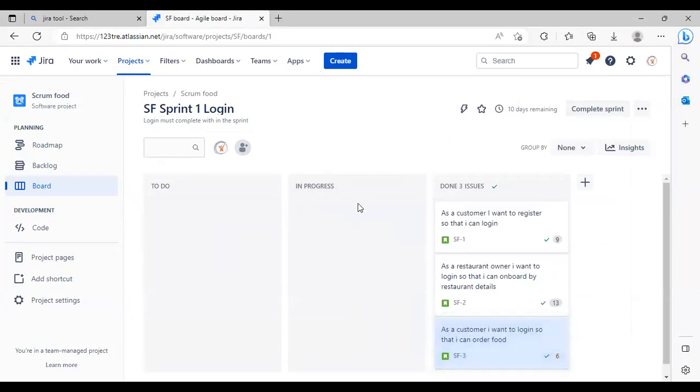In progress means the developer or the tester is developing these features, and once the feature has been completed it moves on. On what basis are we providing the number there, 9 or 6? Estimation depends upon the development team, how much time and effort they are going to put into developing that particular user story. We are having the Fibonacci series, t-shirt sizing, shoe sizing, and different techniques.